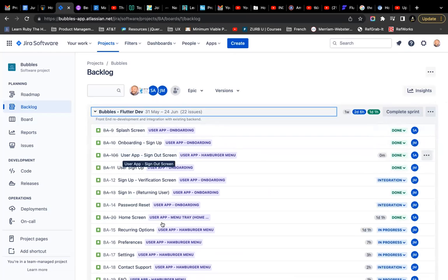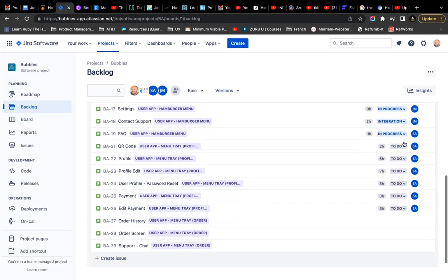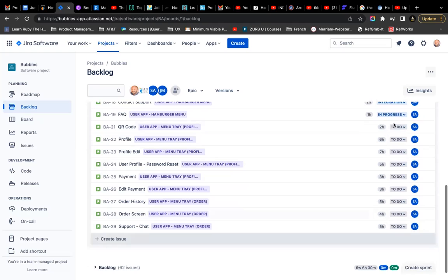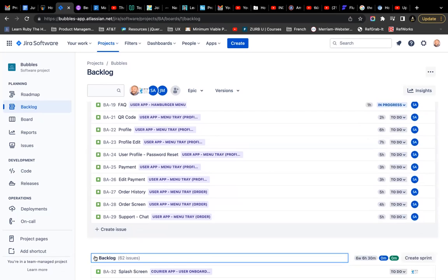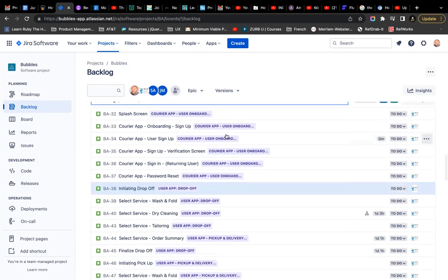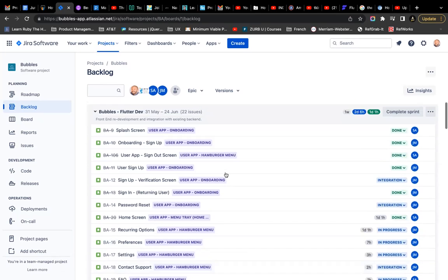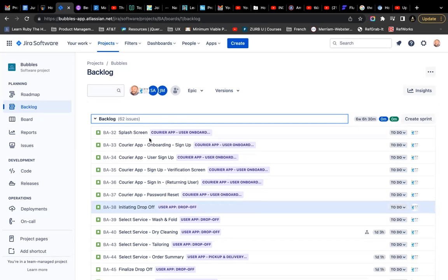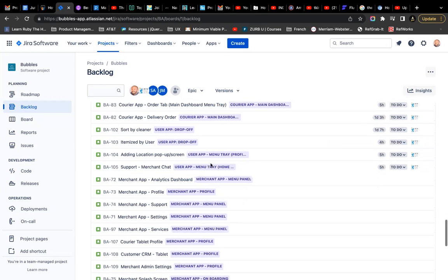And then we have the sign up process. Everything here that is done has a line through it. These are still being done. This one is almost done, we're doing integration into it. Those are in progress, and these are the things still left to be done. So all these come together. When this is done, I need to prioritize with the team what needs to be done next, or prioritize it ahead of time, so that when they're done, we can review what was done in the sprint and then onboard the next sprint. And then I keep grooming the backlog because there will be more stories coming in, and I'm working with it.